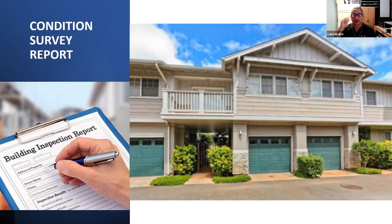It's similar to a building inspection report, where we walk around and look at things, but mainly focused on areas of wood that need repair — such as wood siding, trim, decks, stairs, balconies, railings, handrails, roof fascia, window frames, and anything made of wood. We do a visual survey building by building, and unit by unit, noting down areas that need to be repaired or replaced.